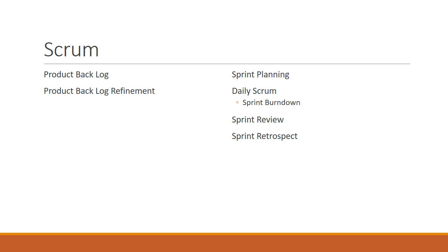And after that, there's what's called a sprint retrospect meeting. During the sprint retrospect meeting, the team basically reflects on what went well, what went wrong, and what they could do better to make sure those issues don't happen the next time. What will typically happen is after a couple of iterations, the team will begin to gel, and you'll actually see improvements.